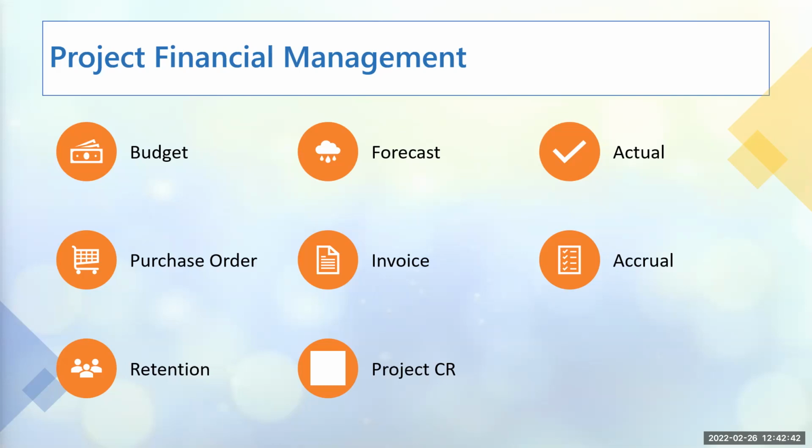Every organization has got a financial billing period. Most of the time it is every month at the end of the month, where the finance team need to make sure that all of the books align together. So you tend sometimes to accrue for work that has been done, but you are yet to invoice it because you don't have the details in place to be able to include it in your invoice.